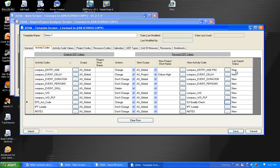This last column will list any changes from the previous import. For example, if I had been importing this file on a regular basis, and there were new activity codes in this file, it would have had a status of new. And if one of these activity codes that I previously imported is now missing, it would say missing over here. So it's a way for the user to determine if there's any new codes coming in or if there's any missing codes.